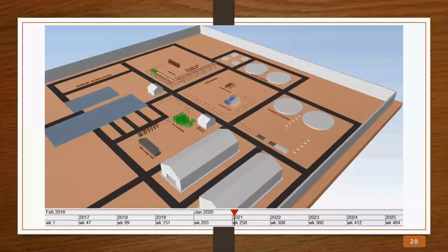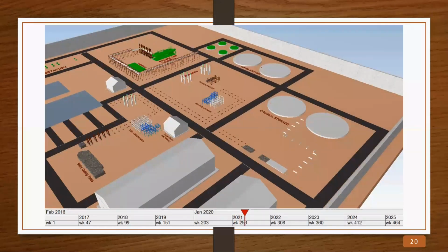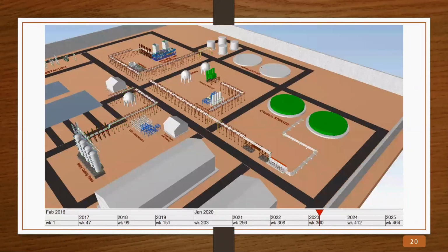The simulation will now, you see all the equipment going in. The simulation will show the pipe racks beginning to go in. For this purpose, we have assumed that the pipe racks will be fabricated off-site. Okay, here are the pipe racks going in right now. And you will notice also that for the purpose of this, we have tried to keep the access roads open for as long as possible. So the racks across the roads are going to go in last. And now all of the tanks are coming up. All the other equipment are beginning to get in place.